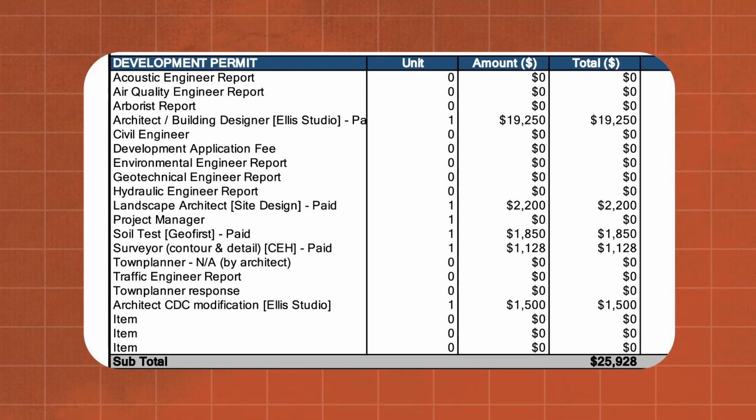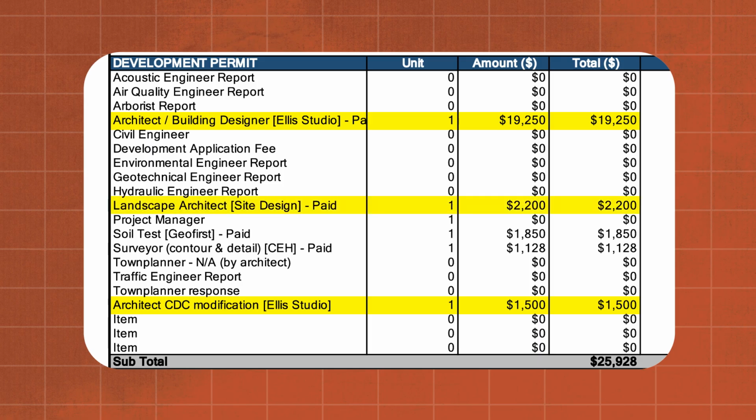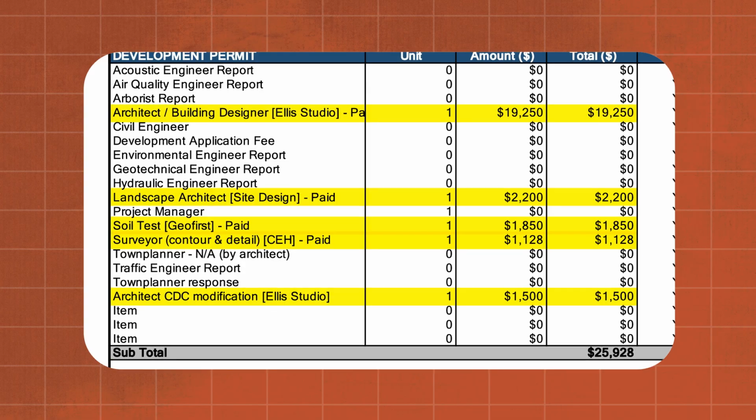So the next stage, once you've got the property or the site secured, is getting your design approval. The design pathway that we went through on this one was called a complying development, so it wasn't the general DA pathway that most people know about. In New South Wales, there's a simpler and easier pathway to get approvals, but your site needs to meet a certain list of black and white criteria. So we went down CDC for this. So for essentially the CDC approval itself, talking about $70,000, which is inclusive of your architect costs, your town planner, your certifier, landscape designers, soil testing, survey, absolutely everything.